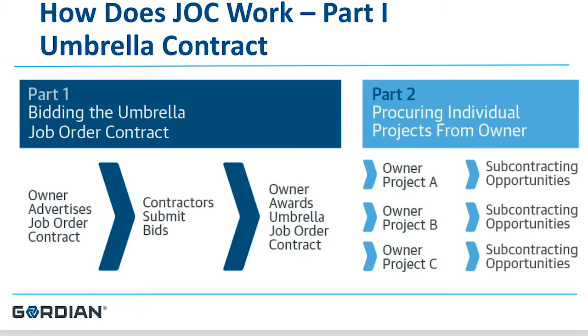They are able to assemble their proposal in the construction task catalog, multiplied by the proper quantity for the item, multiplied by their competitively bid adjustment factor. Supplemental job orders are priced the same way along with each individual job order thereafter. Individual projects will always go through the same process.